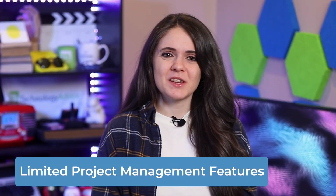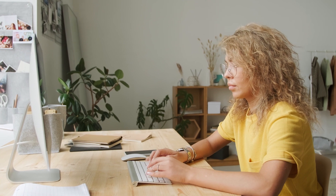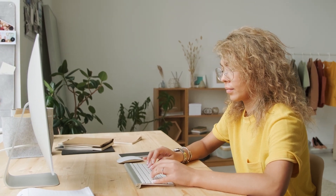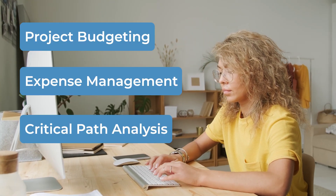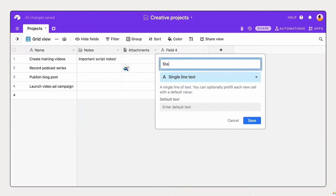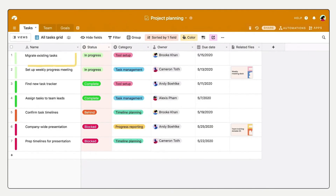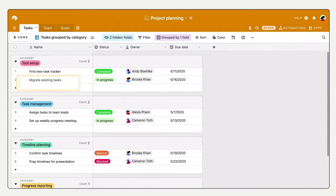Now that we've seen Airtable's good side, let's check out the bad. In my opinion, the most egregious con is that Airtable has limited project management features. As a project management software, this is surprising. Most purpose-built PM tools typically include complex functions such as project budgeting, expense management, or critical path analysis, which isn't the case for Airtable. It does offer a project planning template with a Gantt view, but Gantt and timeline views are available only on higher paid tiers. And despite Airtable's ability to simplify data, some users are not able to make connections among tables like from a full-blown database to create the customized project features they need.